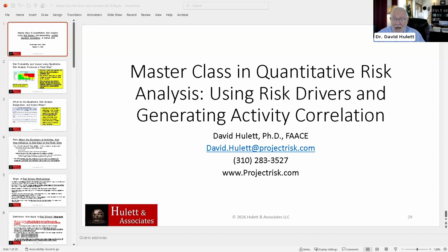Okay, next question. Yes, we're very excited about the next version. So another question. If risk probability is greater than 50%, shouldn't we challenge the risk existence? I believe this shouldn't be the case as a risk, rather build it into the project plan and add an opportunity applied that X risk doesn't occur.